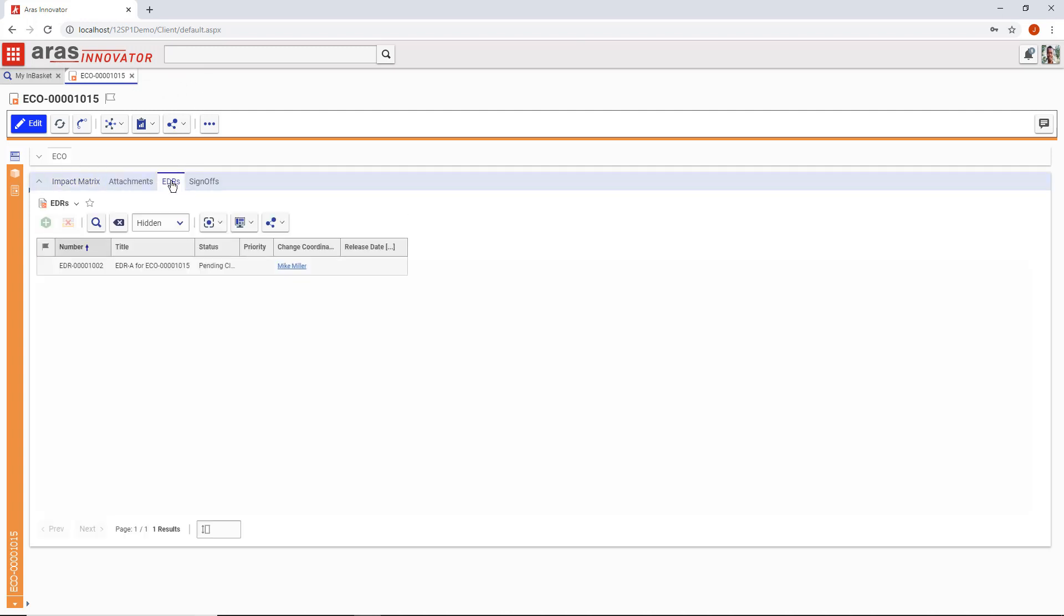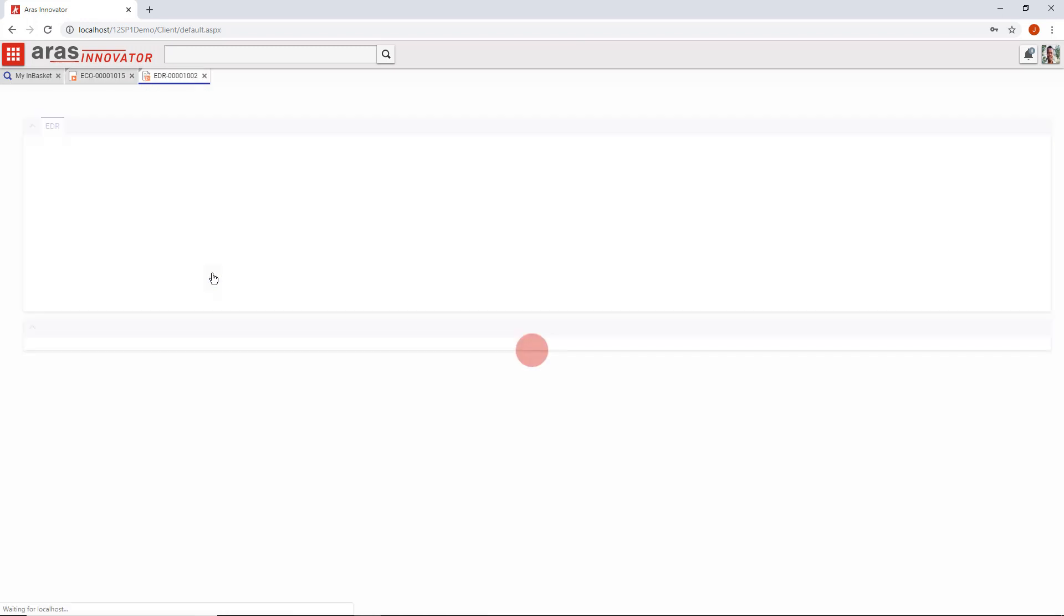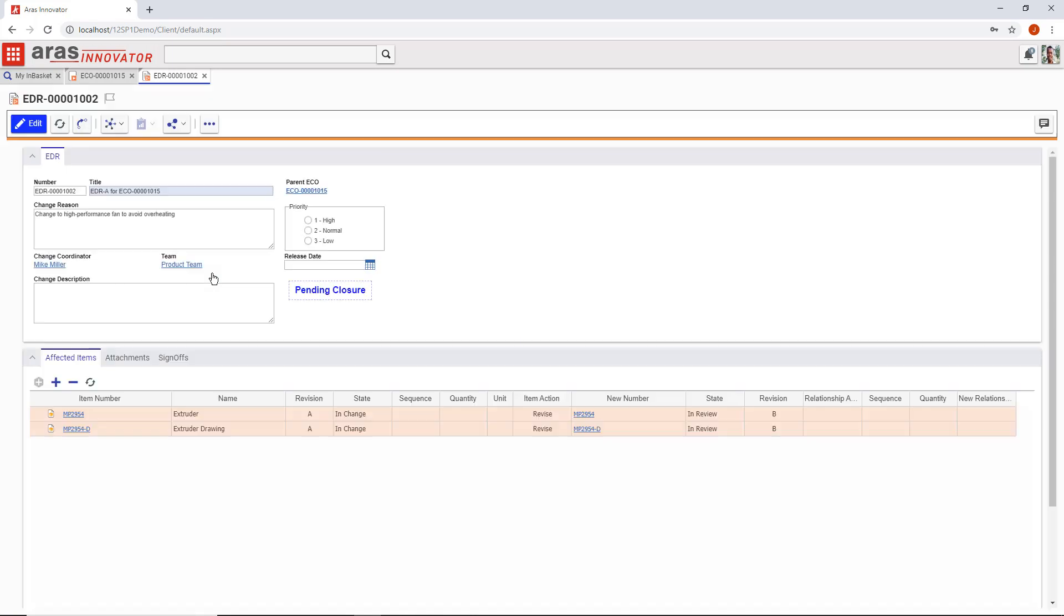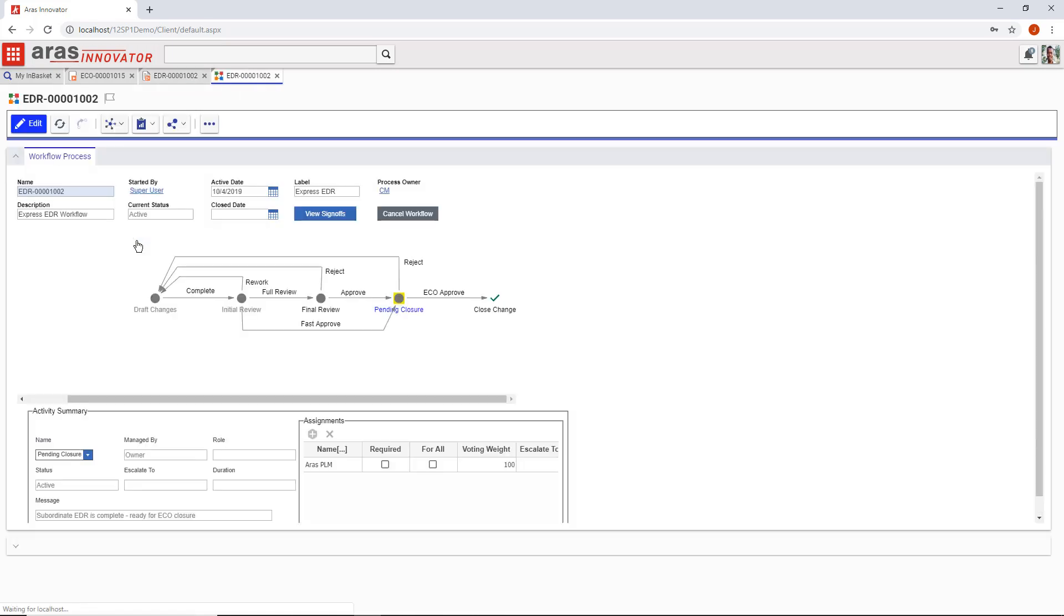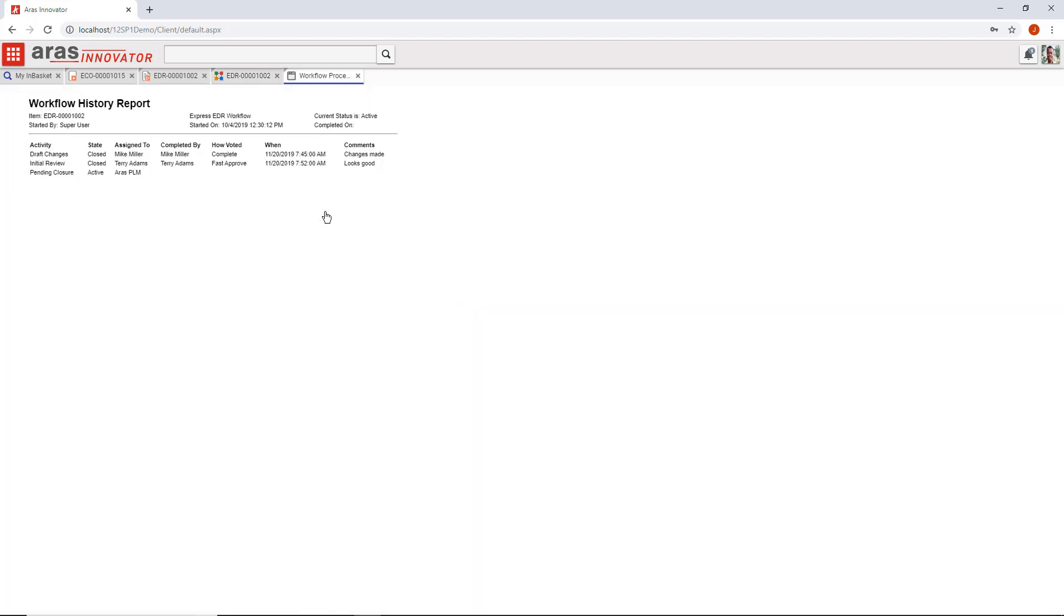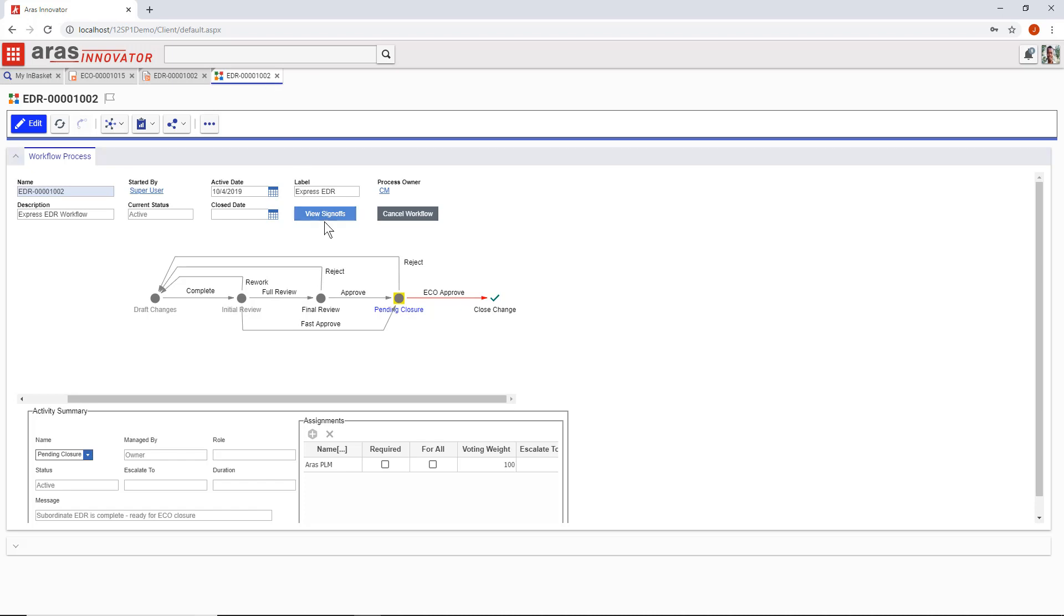The EDR workflow depends on the release of the ECO. That means it's not released until the engineering change order is complete. You don't want a drawing in your system that doesn't match the part it references, so the EDR is governed by a sub-workflow of the ECO. They both have their own separate processes, teams, sign-offs, and audit trails.